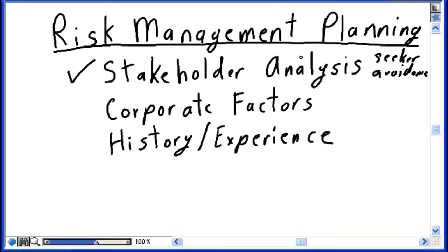Other projects are make or break situations. If this project fails, the business will be in trouble, and these absolutely need to be risk avoidance projects. You need to ensure there's sufficient structure in place in your project. You need to ensure there's sufficient contingency and processes in place to mitigate and eliminate project risks before they're encountered, to ensure that your project does successfully complete.